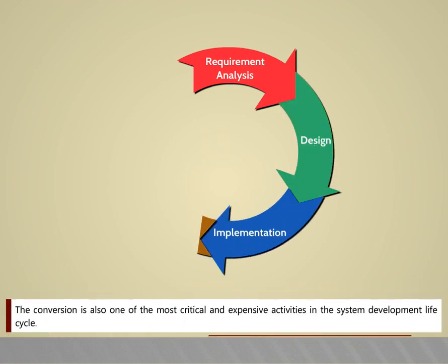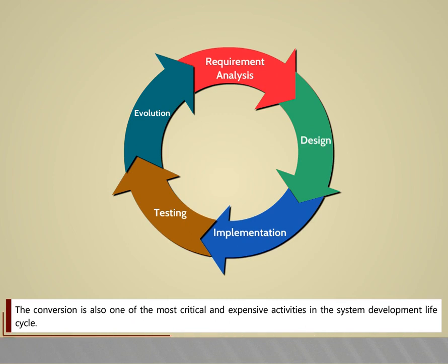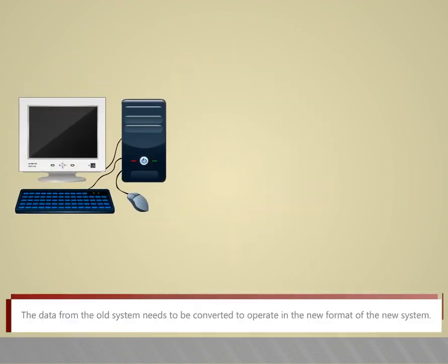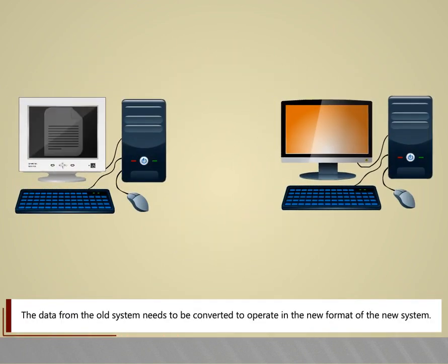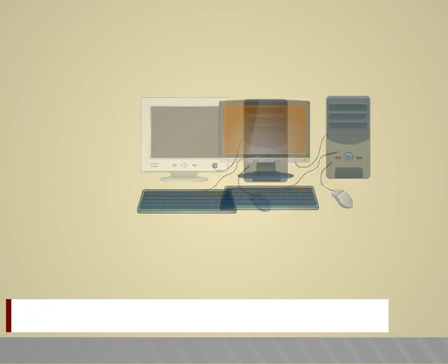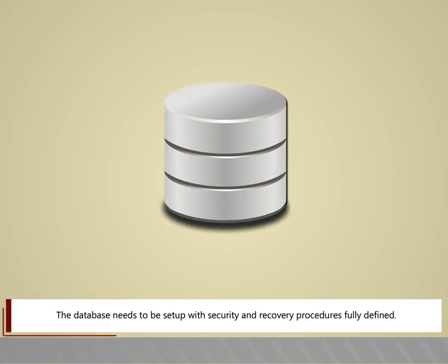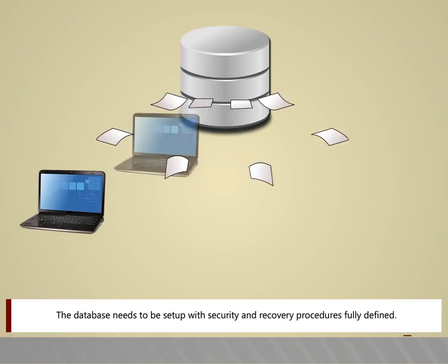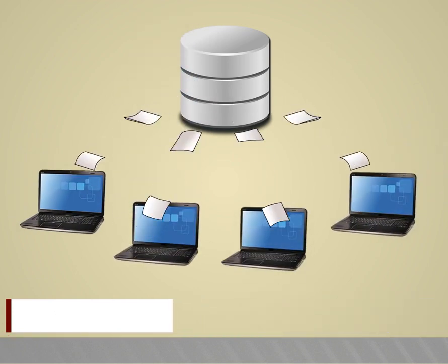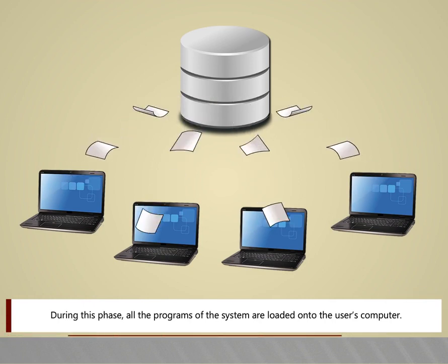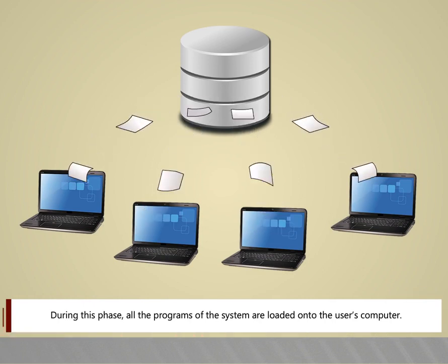The conversion is also one of the most critical and expensive activities in the system development lifecycle. The data from the old system needs to be converted to operate in the new format of the new system. The database needs to be set up with security and recovery procedures fully defined. During this phase, all the programs of the system are loaded onto the user's computer.